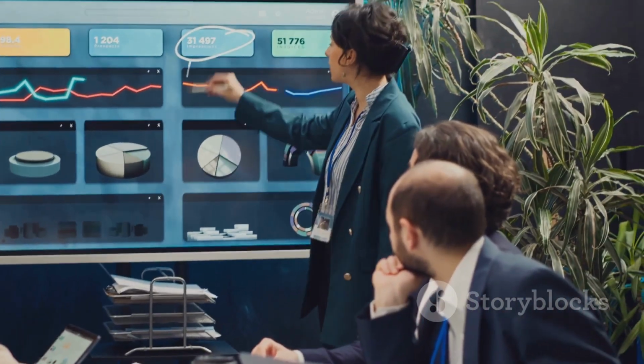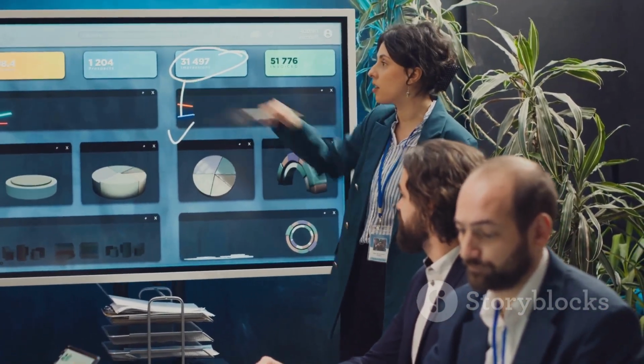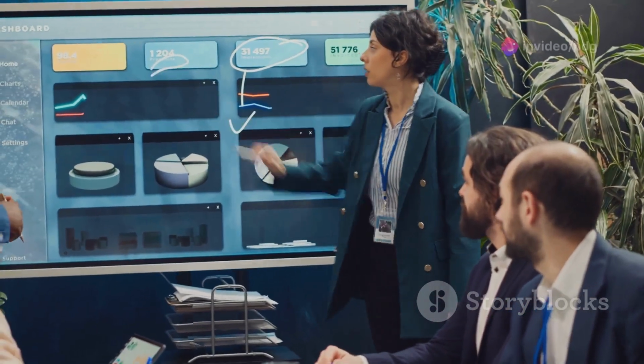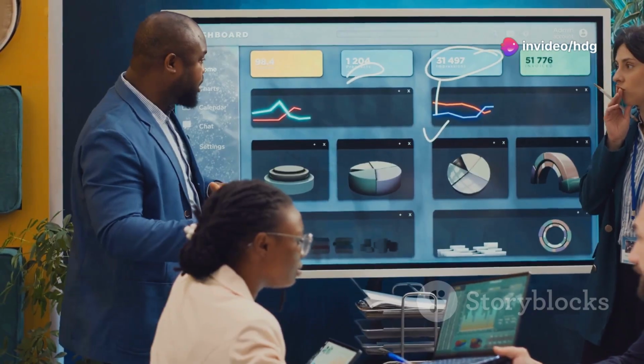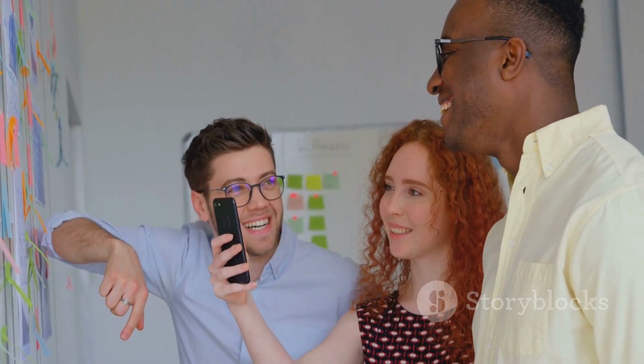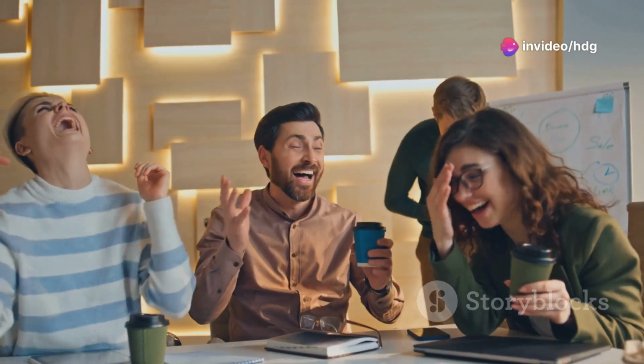The purpose of the Daily Scrum, or stand-up, is to keep everyone aligned, identify any blockers, and make sure the team is on track to meet the sprint goal. Tips for effective stand-ups. Stick to the 15-minute time box. Stand-ups are meant to be quick updates, not detailed discussions. Focus on collaboration. If issues arise, take them offline after the meeting to keep the stand-up moving.